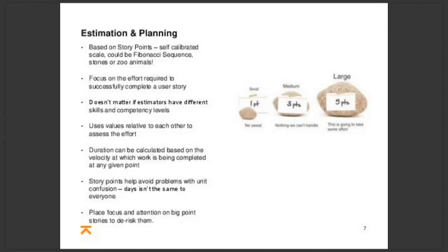So, that was a bit of a silly example, but a lot of it is common sense, but hopefully we can see that we quickly reached a scale for the work. The 3 of us reached consensus, and we can put some sort of measure on how much effort a sports car and a coach is going to take to wash. So we can use that information next time when we're planning the next set of vehicle washing, because we'll actually have some figures for doing those 3 sizes of vehicle.